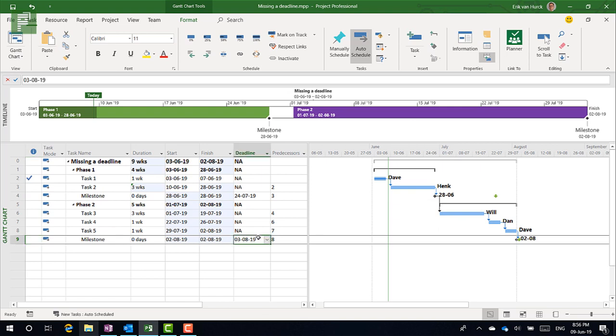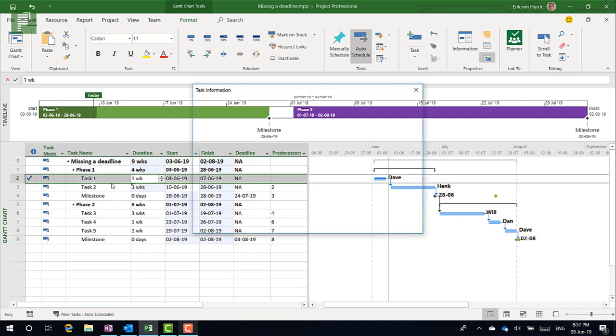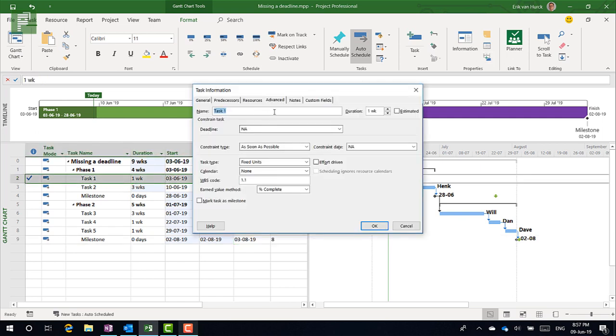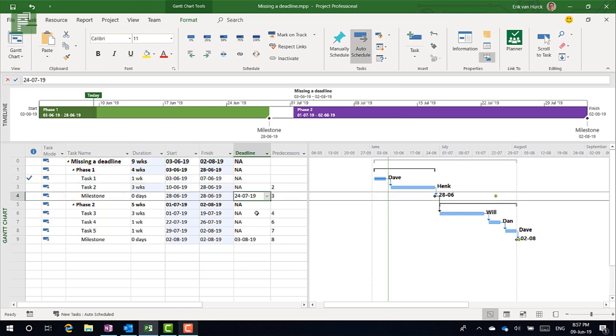So this was a short introduction into deadlines. This is a very useful tool - I don't see it happening a lot where people actually use this, but that might be because you don't know about this feature yet. So now that you know, there's two ways to get to that deadline: you can double-click on the task to open that task information page, go to advanced, and click on the deadline, or you can add a column and note down a date that is actually set by an external source.